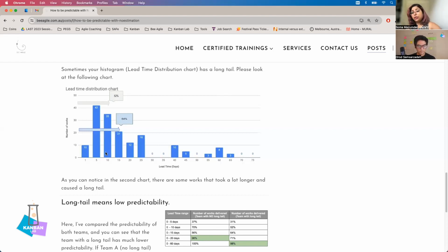So let's say I also have a Scrum product backlog where everything is there. Now, what I'm trying, I start with just capturing lead time. Like how much does it take? But if I'm taking everything as a whole, that might not give me the right idea, because every kind of work is different and they might need different kind of attention and the workflow could be different.